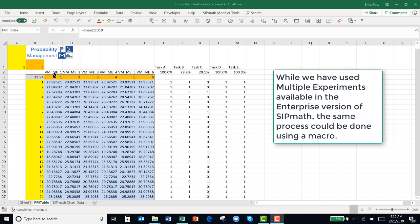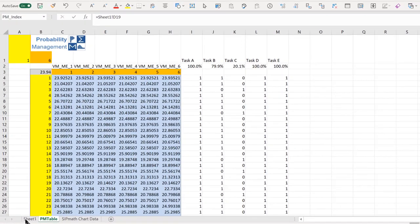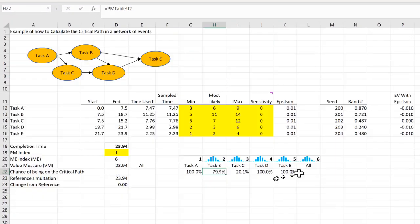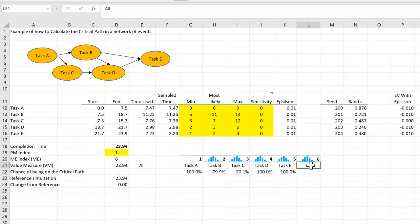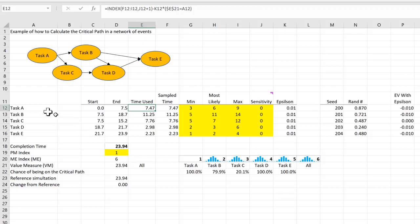And it's run six different simulations. Simulation 6 is actually no epsilons. We can see that over here, at 6 it says all. And epsilon is only added in when this variable here is equal to the task.